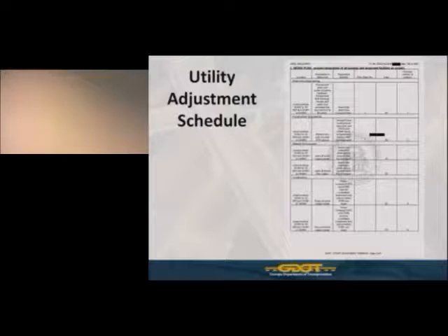Now, if you go over to their detailed work plan, you'll see that they identify on their preliminary engineering: review final plans and power company laydowns, review final field drawings, review and verify road contractor has any revisions to the plans. So the dependent activity is needing final plans from Georgia Power. Since they're an attachee, obviously they need to know where the Georgia Power, the pole owner, poles are going to be. But that is being completed after Georgia Power has done their work. Now, that's showing in preliminary engineering, and I'm going to discuss that here in a minute in section D, but there should have been some level of preliminary engineering that could have occurred prior to this.